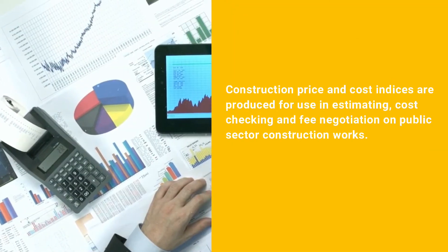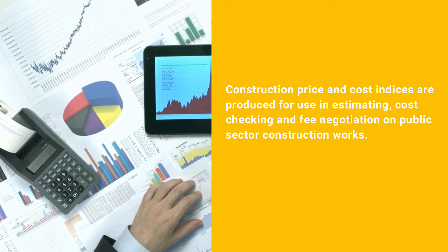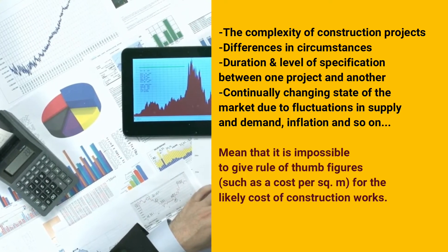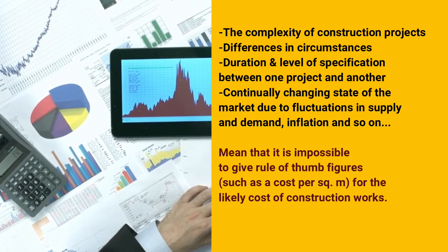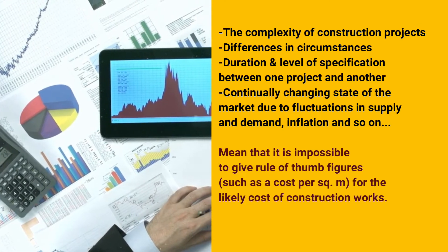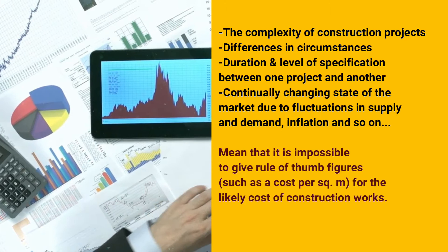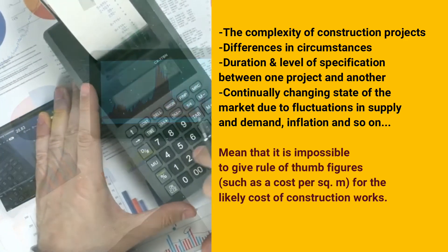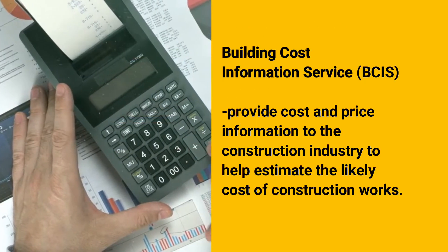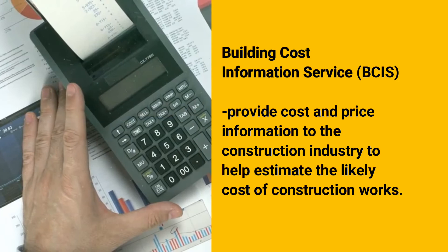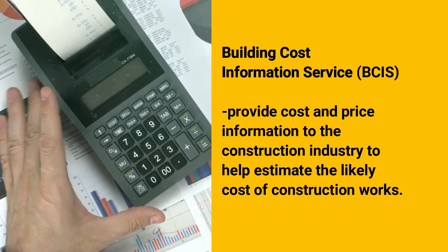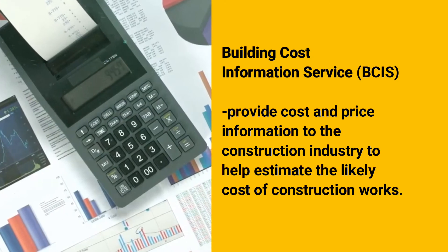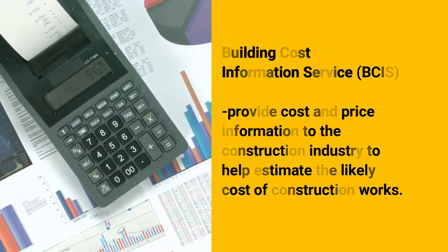Construction price and cost indices are produced for use in estimating, cost checking, and fee negotiation in public sector construction works. The complexity of construction projects, the differences in circumstances, duration, and level of specification between one project and another, and the continually changing state of the market due to fluctuation in supply and demand, inflation, and so on, mean that it is impossible to give straightforward figures such as a cost per square meter. Private sector organizations such as the Building Cost Information Service provide cost and price information to the construction industry to help estimate the likely cost of construction work.